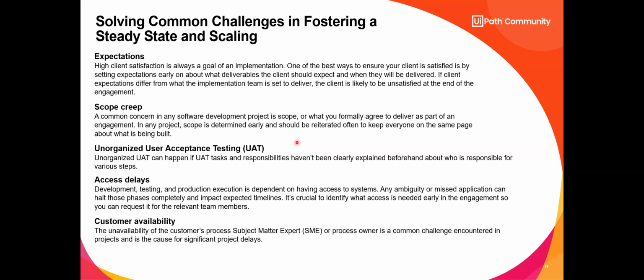We can work on that later after we get this piece of it running. So we may automate A, B, and C, and then leave D through F as technical debt. That's not necessarily considered scope creep. And that's sometimes something that we can easily throw into a backlog, but it's going to be a higher priority in that backlog because it's considered technical debt.